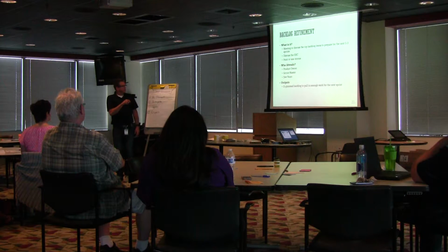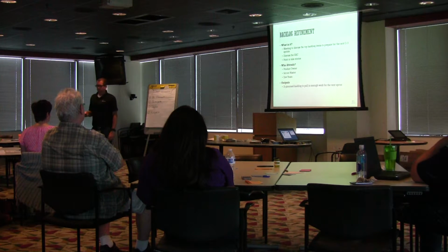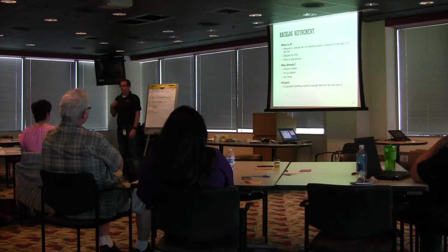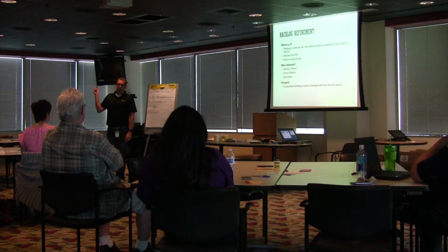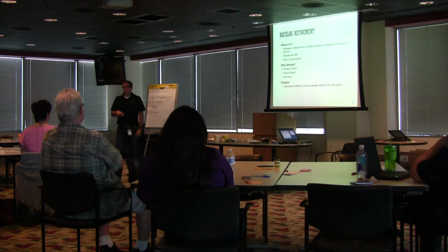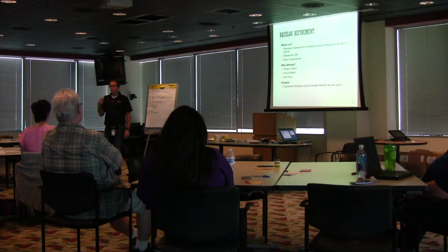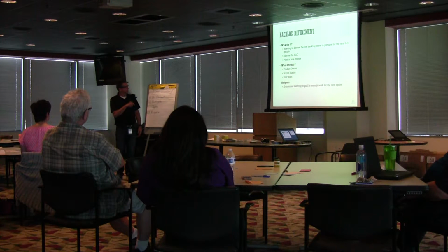They make point or size of story, i.e. estimating. Don't get hung up on what a point is, but they size it. One technique is story points, which is a modified Fibonacci sequence. 1, 2, 3, 5, 7, 8, 13, and modified goes to 20. Some teams might use other techniques like t-shirt size.